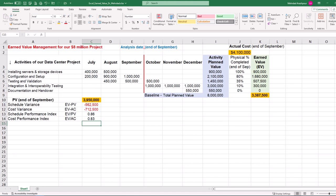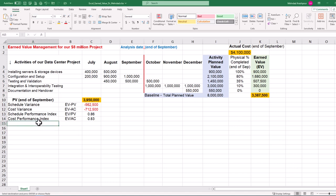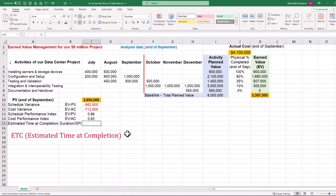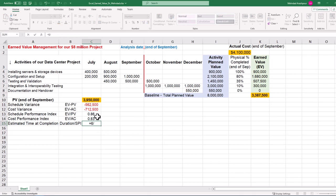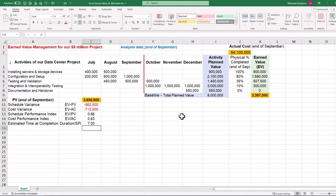The beauty of this project control technique is to predict when our project is likely to be completed based on the current rate of progress and expected future performance. To calculate project ETC, divide the planned project duration of six months by the schedule performance index. We see that based on the current rate of progress, the project is expected to be completed in seven months, indicating the risk of exceeding its planned duration of six months.